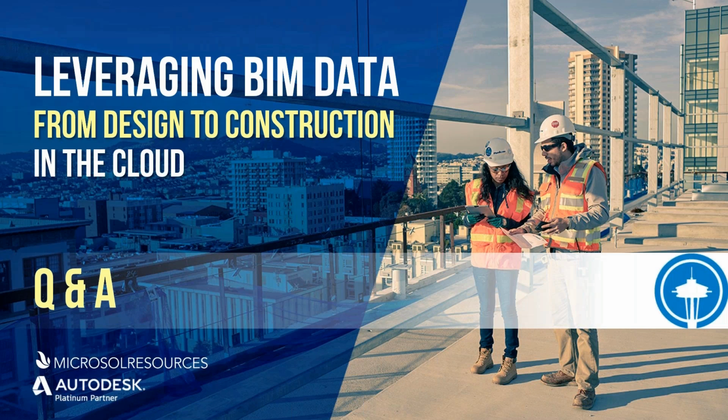So what we're suggesting right now is anybody that's working in BIM 360, keep your projects there, any existing projects there, and because you can view projects from both platforms in the Unified Platform, start any new projects in the Unified Platform. That way you're not taking a day or two to move all that information around at the moment. Hopefully it comes soon, but they aren't telling us when that might be provided.